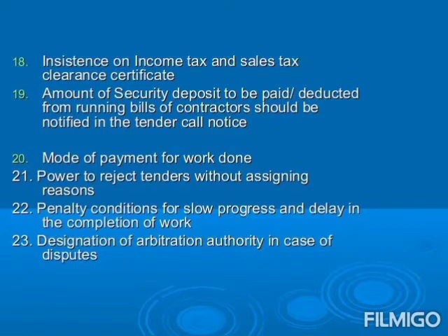Number 19. Amount of security deposit to be paid or deducted from running bills of contractors should be notified in the particular tender call notice. Number 20. Mode of payment of the particular work done. Number 21. Power to reject tenders without assigning reasons. 22. Penalty conditions for slow progress and delay in the completion of the particular work. Number 23. Designation of arbitration authority in case of disputes.